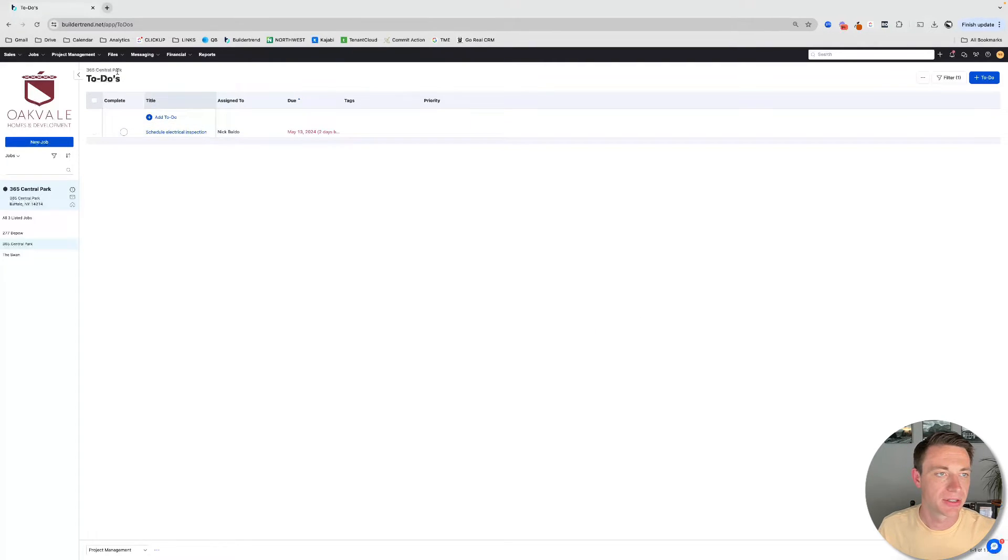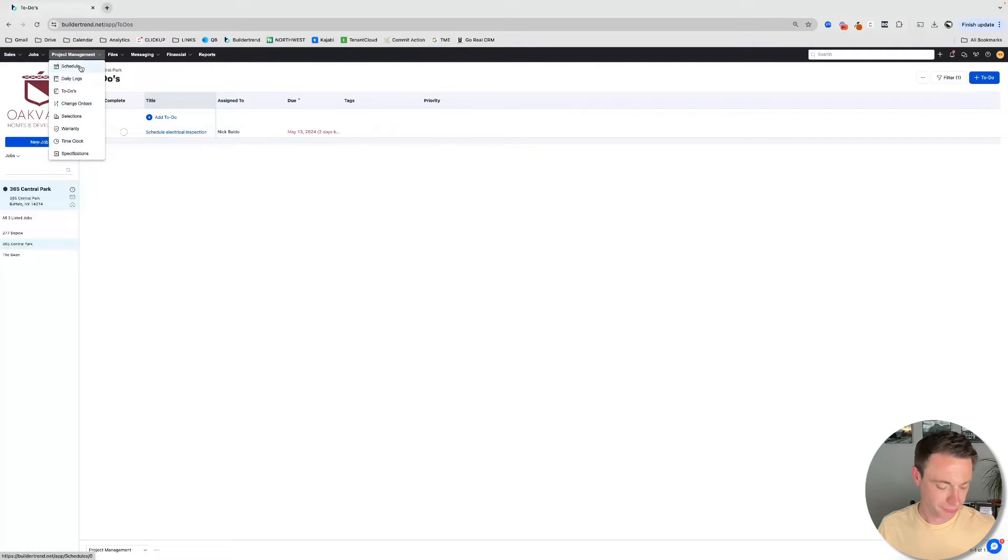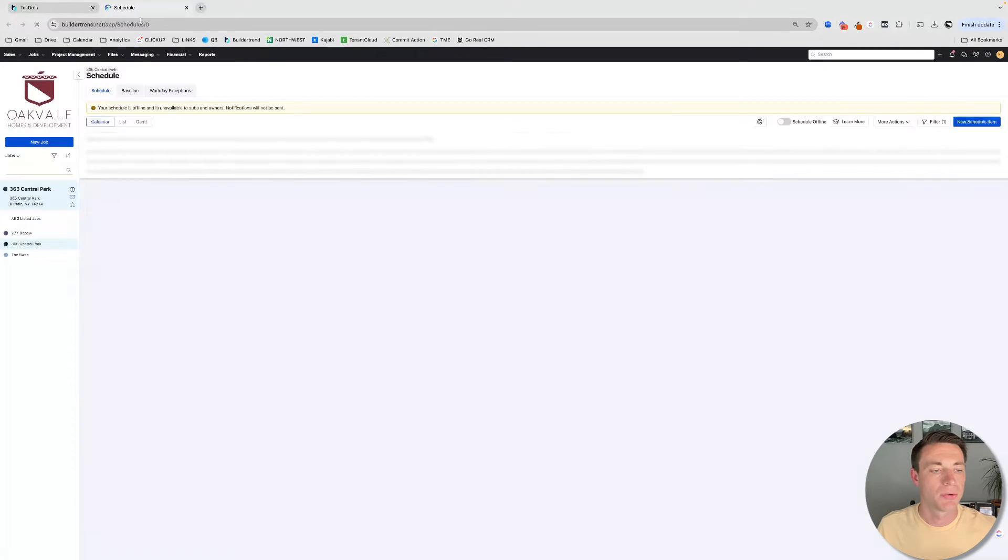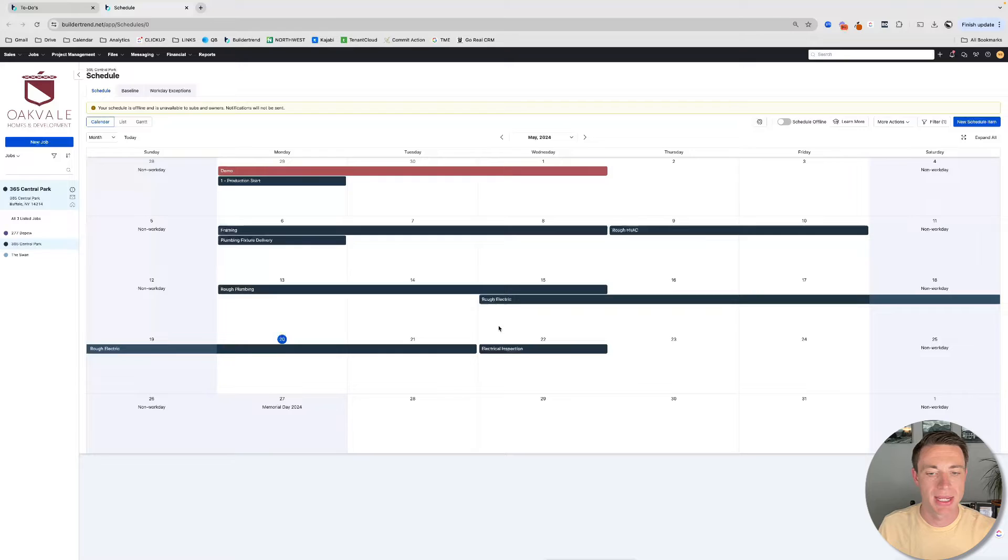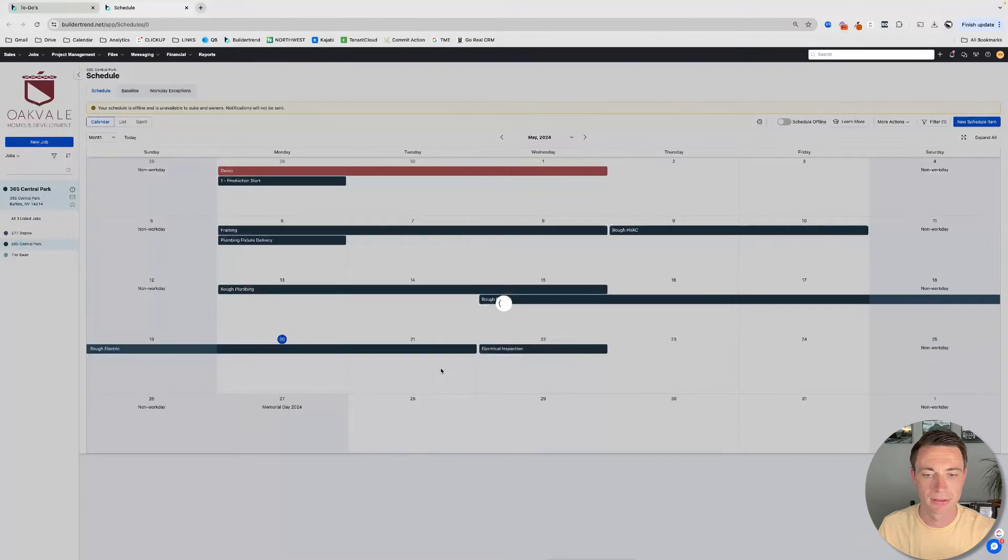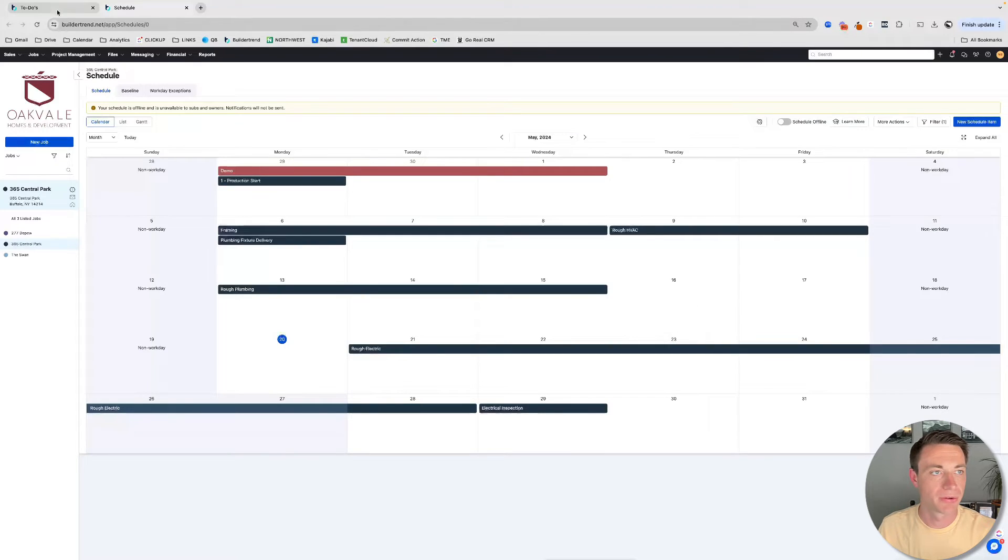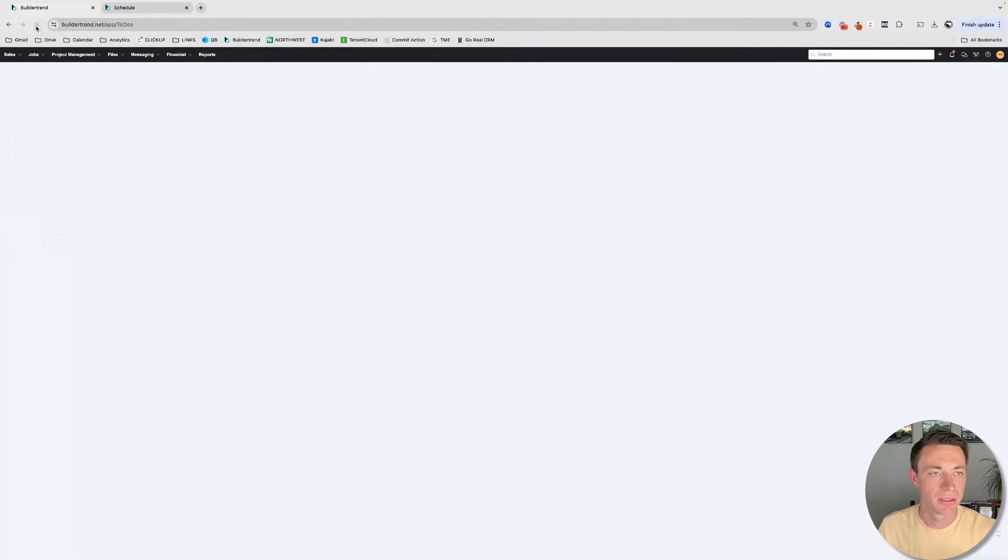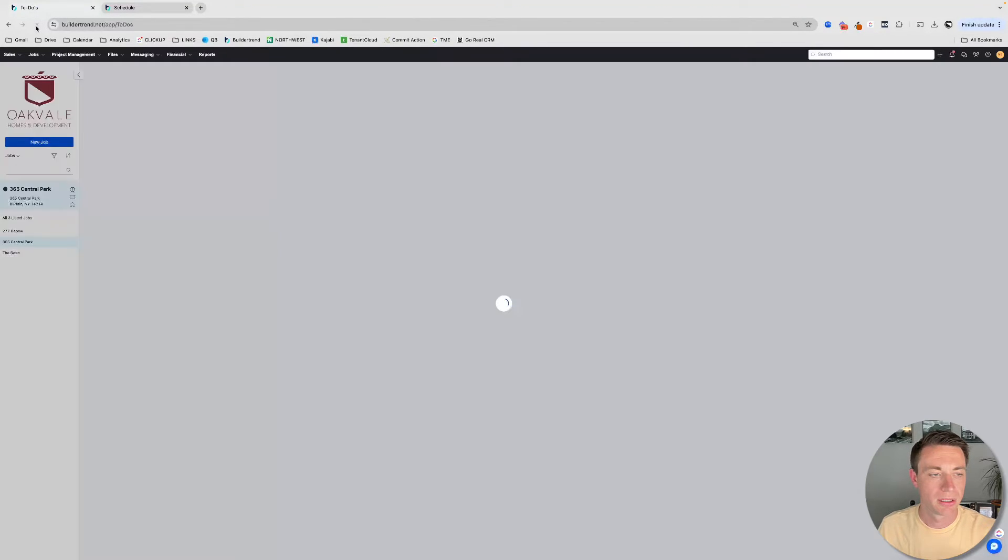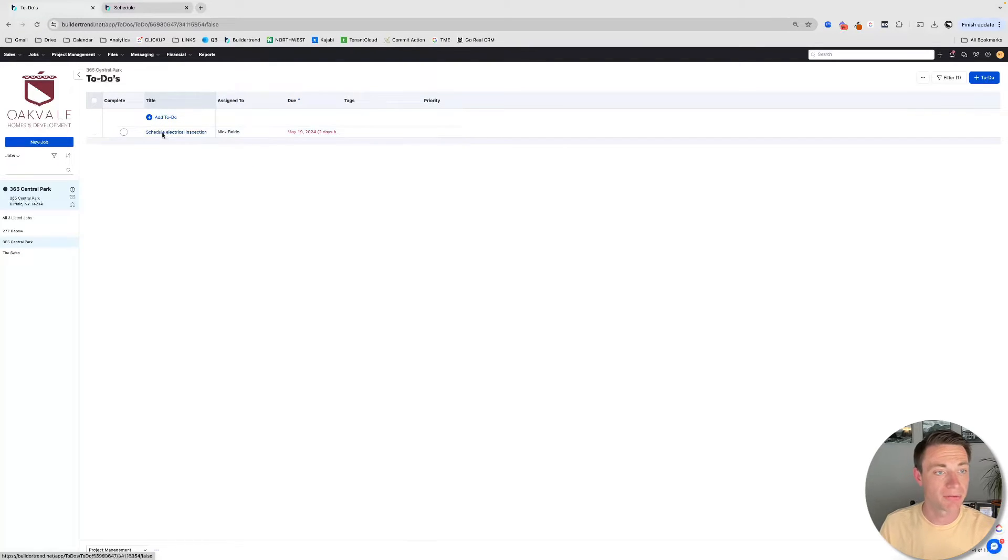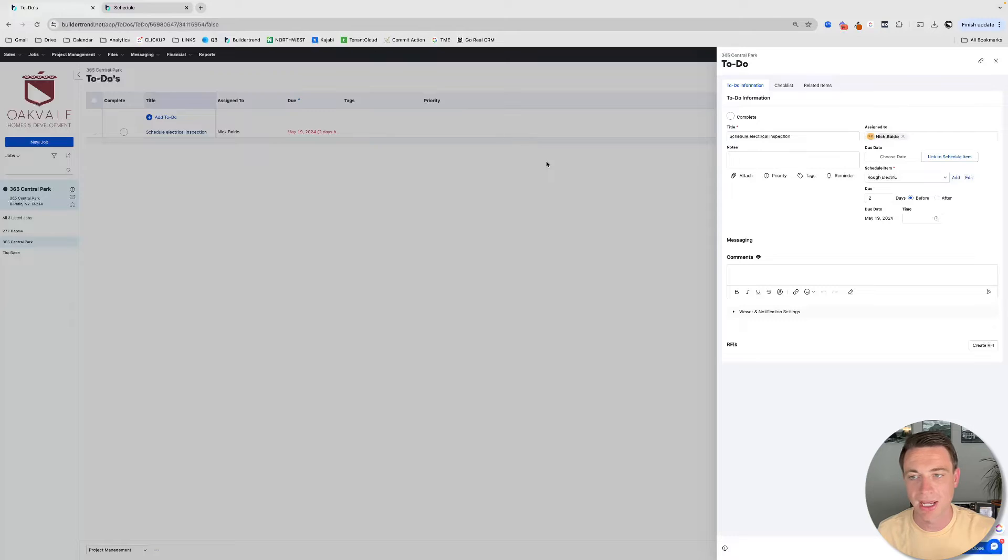Now I'm going to open up my schedule on another tab here. So watch as I move rough electric down here. Now my inspection moves. Great. If I refresh here, I'm going to see that my due date moves. And it should, right? If the whole project is moving, in this case, out, I don't have to do this task until later.